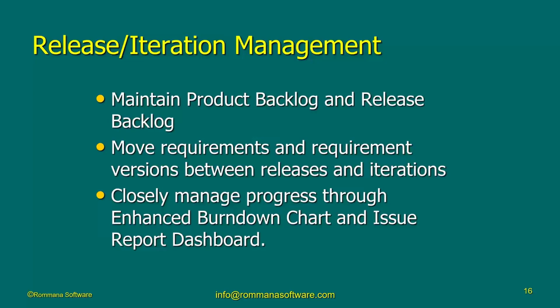Every project is implementing certain user stories or requirements. Some of those projects are agile, some of them are using a non-agile methodology. It doesn't matter. The release manager needs to pull out some features from some of those projects and put them into a release. So the relationship between a release and the projects is very much many to many, because a given project can deliver features to more than one release. And not necessarily all the requirements or the user stories implemented in one project are going into the same release. I mean, this is common sense of release management.